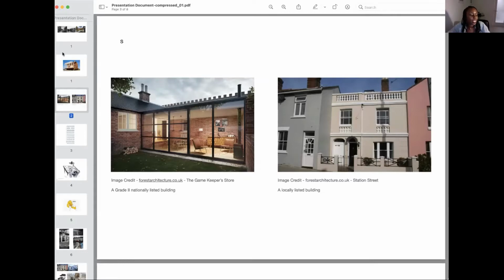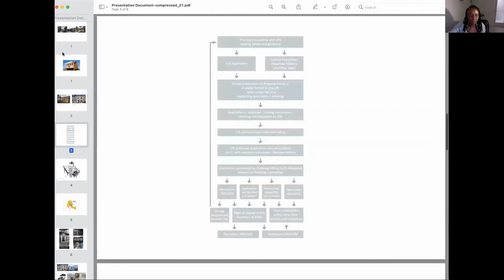So that leads us nicely onto our 3rd issue, and probably the biggest issue, planning permission. So I understand from talking to our American friends that we have a pretty onerous planning process here in the UK. I won't delve into this too much, but this diagram explains the process. And in brief, if you wish to make a significant change to a building, we have to submit proposals to a local government team for approval. For the sake of this presentation, we will just call them the planners.